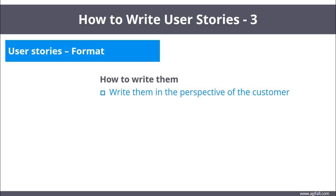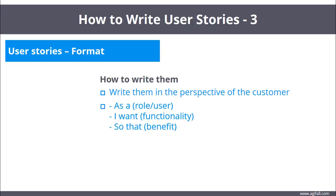See the video on how to use and write personas. Number three, look at the format we can follow. This isn't the only format, but it's the one I'll present today. Letter A: 'As a' — and then we talk about the user or the role of the person. Then the next part, 'I want to' — and then we talk about the functionality. And then letter C, 'so that' — we present the benefit here.